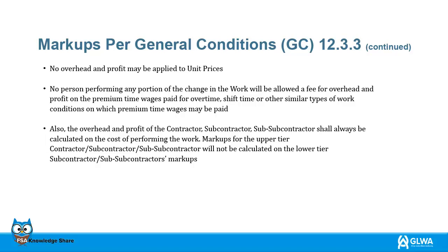Also, the overhead and profit of the contractor, subcontractor, and sub-subcontractor shall always be calculated on the cost of performing the work. Markups for the upper tier contractor or subcontractor will not be calculated on the lower tier subcontractor's markups.